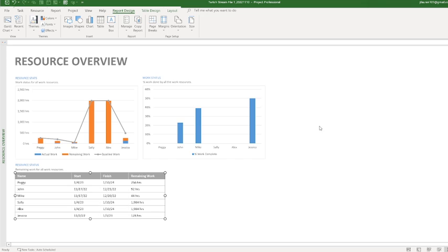And you might include, if you wanted to, what we call level of effort tasks. So, in scheduling best practices, we do have tasks called level of effort tasks. And these are the things that cover the mundane stuff. So, if you're in technology, for example, some of the mundane tasks may be like operations and maintenance stuff.